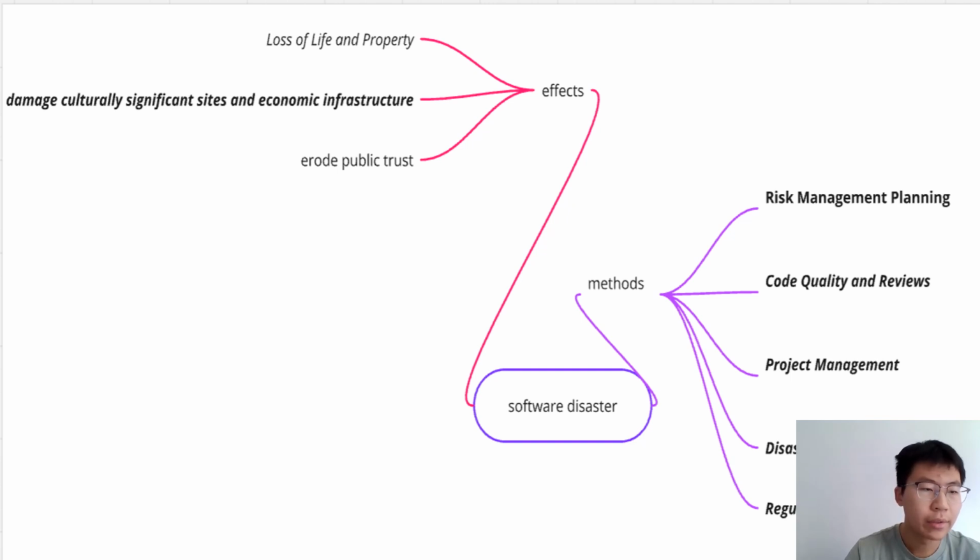And for the measures, stating lessons learned from the experience, to refine the parameters for live monitoring of baggage performance, to provide for staff surge and control posts on the opening day, to establish a joint BA crisis management team at terminal level for critical events and crisis situations, and so on. Let's give a summary of the two cases.